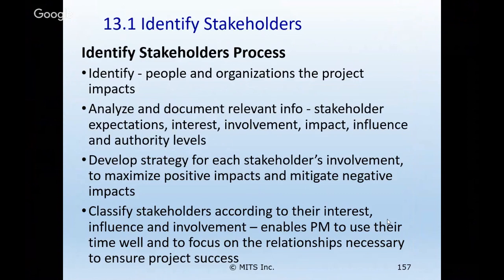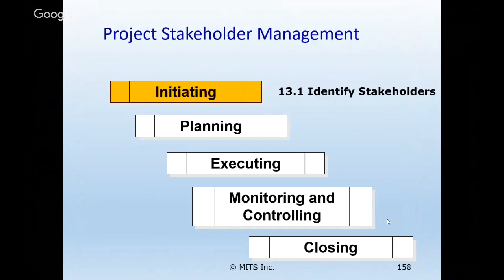And we're going to be doing some matrices coming up, looking at influence and power and influence and involvement and interest. This will help us figure out how best to work with different stakeholders. We can't spend all our time working with all the stakeholders. There may be some that need the daily contact. Their sponsor may need regular updates and things. Others, monthly newsletter maybe, if they're not really highly engaged. So it'll depend on various factors there.